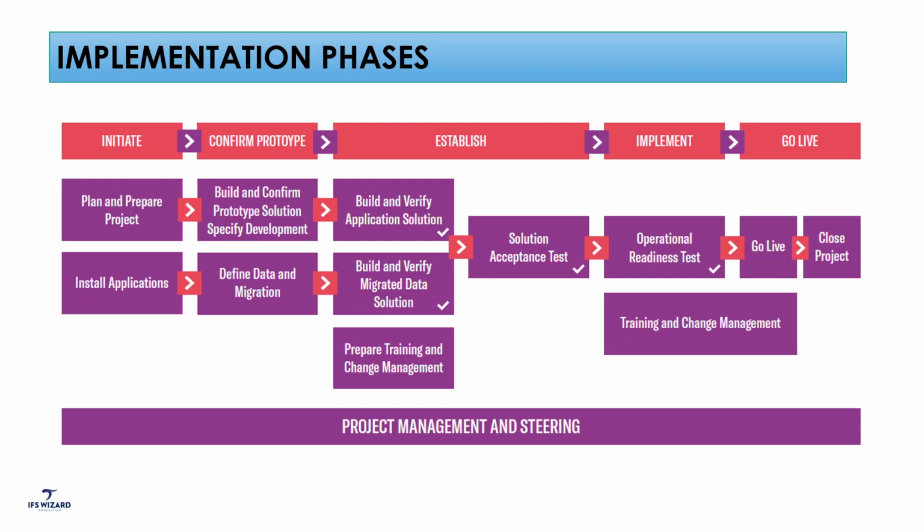After that, we move on to the go live phase. Once you have a go live date, of course, then you have a cutover or a blackout period. It could be weeks, could be days, based on your organization. Then we go to go live, where we do a migration for the live environment and turn on the system. That's basically go live. In the go live session, as consultants, we support clients if there are any hiccups or if they need to verify any data.